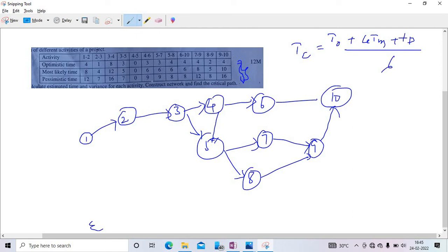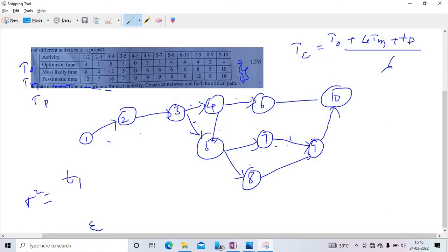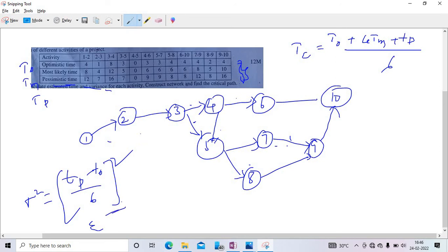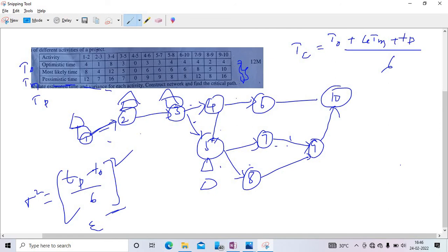Compute te values for each activity using the formula. Then calculate variance using: σ² = ((tp − t0)/6)². After computing all te and variance values, find the critical path using forward and backward pass — earliest event time and latest event time. Wherever these are equal, the activity lies on the critical path. The path likely goes 1→2→3→... through to 10. For any doubts on the detailed steps, refer to the topic-wise videos. Thank you.